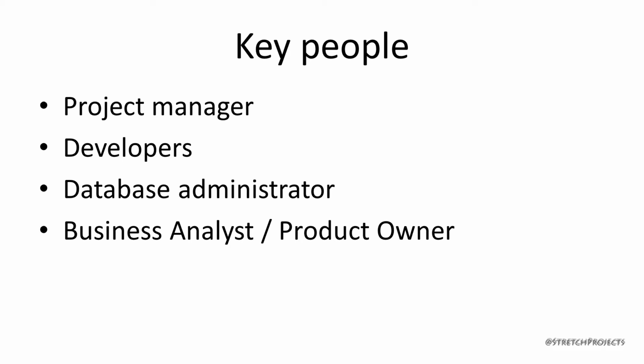As the development progresses, it is quite common for the product owner to stop attending these meetings, but it is especially important during the early stages that they do attend, and that they actually contribute to the meetings. This is because, especially during the early stages, the development team are learning about the process that they're working on. It's often the case that a development team will have no involvement in the process before they are actually asked to develop the solution, and so they often have questions about the implementation, which they wouldn't have thought to ask until it actually comes to implementing them.